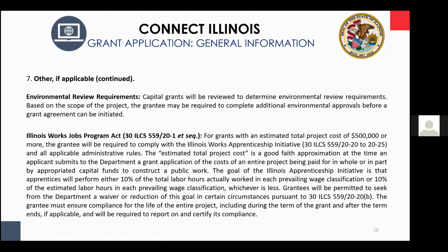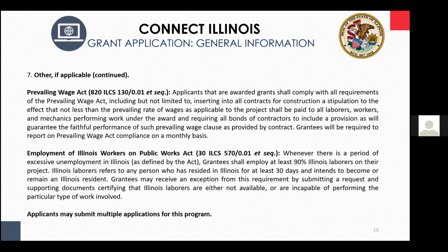We have the Prevailing Wage Act that applies to programs, and I just want to emphasize this is the one that there really is not a lot of leeway with. And so I want to make clear for potential applicants, we did have an applicant in round one that was not aware that prevailing wage was going to apply. And I don't want anybody to be surprised by that here in round two. Prevailing wage does apply. We'd be happy to connect any applicants with the Department of Labor to help address any questions you may have, get a better understanding about what those prevailing wage rates would be in your area, because they do differ from one part of the state to the next.